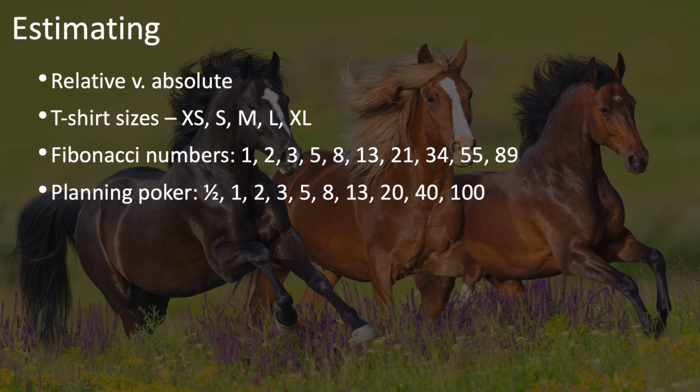One at a time, you go through the list of user stories. You discuss the user story, including its requirements, its definition of done, and so on. People ask and answer questions, and the answers are added to the user story. Then, when everyone has a good understanding of the requirements, each person picks a card that they think is its relative size.